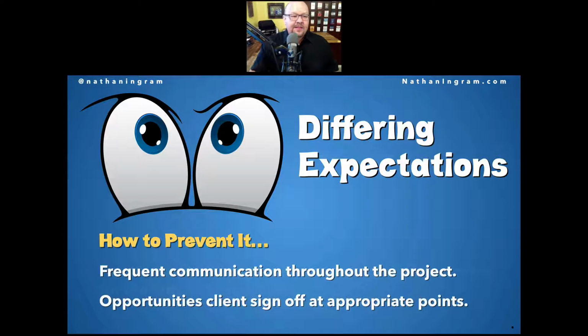consultation. Now, the other thing that's important to keep expectations on track is frequent communication throughout the project. You want to be sending clients updates about what's going on with the project, where things are, if you're delayed, why you're delayed. By the way, if it's the client's fault, you want to let the client know that. One of the best ways that I do that is what I call the 3-sentence email. It's something I send to every active project on a Friday afternoon before I quit for the weekend. The 3-sentence email focuses on past, present, future. Past, present, future. 3 sentences.